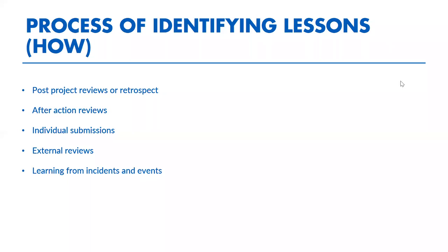And therefore, now that we are reaching towards the end of the program, we've kind of run out of time because that time was taken up at the beginning. And therefore, going forward, what DFID, if they have learned anything from this, is that they need to build in an inception period, which doesn't factor in implementation time. So 6 months plus 3 years is what will allow the projects to form these collaborations and also to implement the time for the full 3 years.